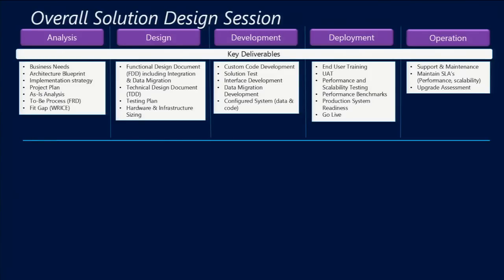Even today, we're dealing with a few issues. I've got a large distributor out of Europe, and what they've done is they've gone straight from the requirements document right to coding. I'm missing functional design, I'm missing technical design, and now what happens is they put it in front of the customer, and it's not meeting the needs, right? So just some basic level of discipline that we want you guys to follow.